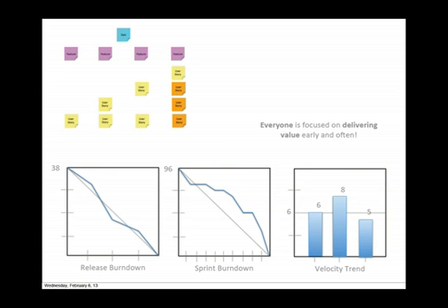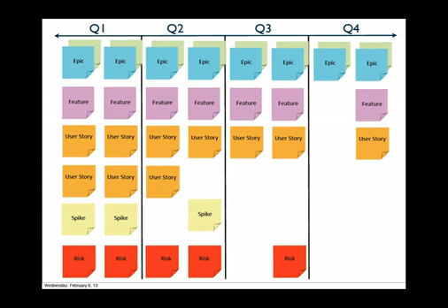We've got our team level view where we take our story maps, our minimally marketable, we stabilize the teams, we start taking a little bit of a longer planning horizon. We're willing to roadmap out a little further than maybe we are today. We know that we want really fine-grained detail in the current release horizon, maybe a little bit of an idea of what's happening in the next, and we realize that Q2 and Q3 are a little bit more of a crapshoot. But the idea is that in this case, we really want to be intentional about pulling risk forward.